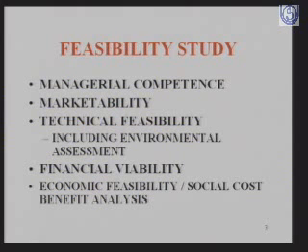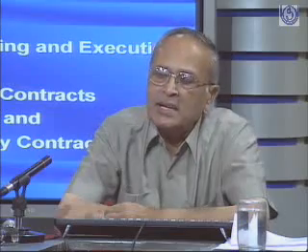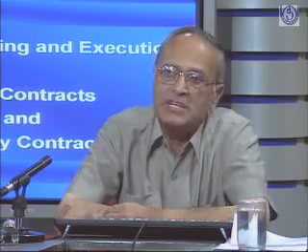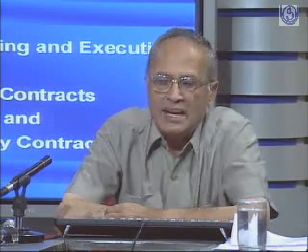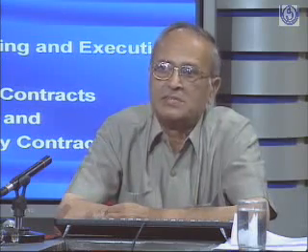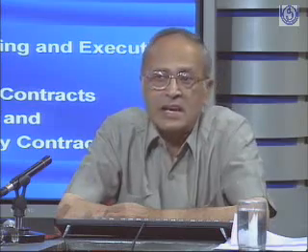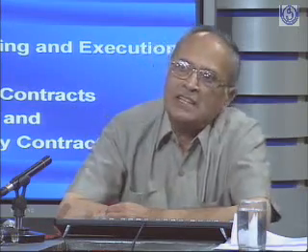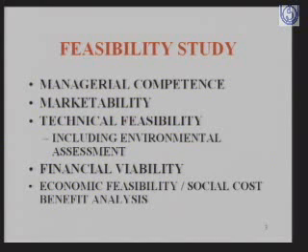want to make within a reasonable cost of production, and I should be able to sell in the market at sufficient margin which gives me profit, which gives me return for the investment that I have made in the project. That is what the technical feasibility means. If I see that the project is technically feasible, I will go to the next stage, and if I find the project is not technically feasible, I will stop the project there itself. So there is no point in doing my next stage, which is the financial viability.